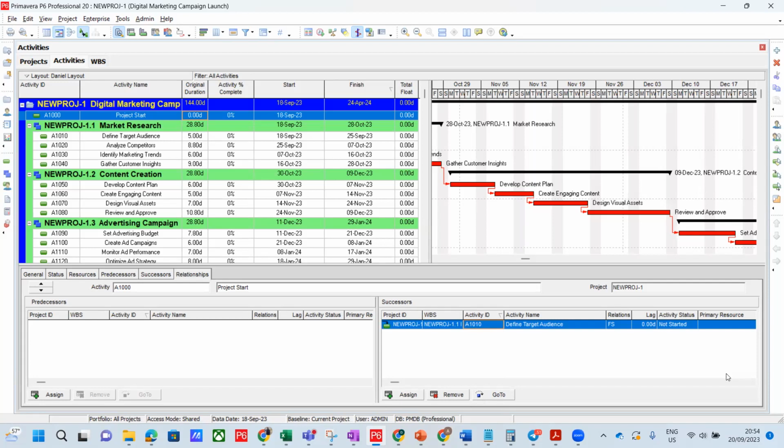You can hire me today. If I finish that task, you can ask me to do another task. So I'm reusable. Non-labor is reusable. You can bring a machine today, use it for excavation to excavate some rubble, and tomorrow you can use it to excavate other rubble somewhere else within the same project. Material, most of them are consumables. So you cannot reuse them.